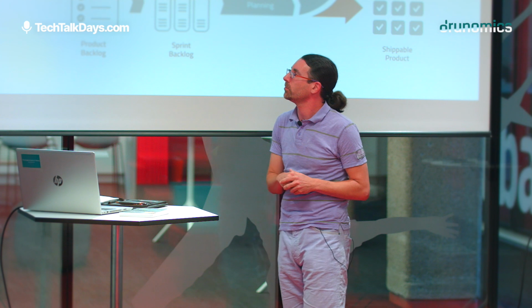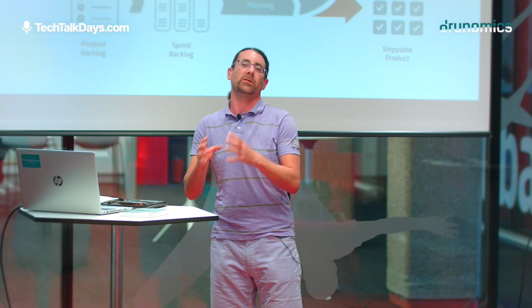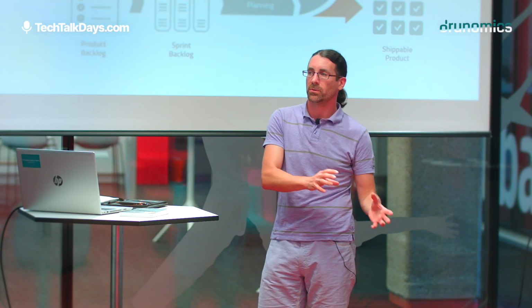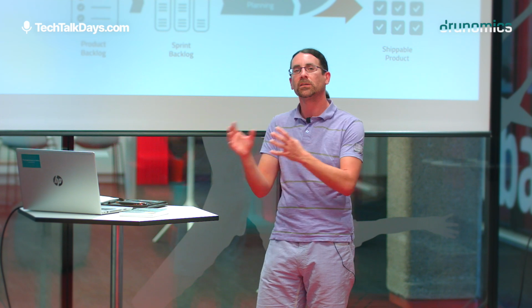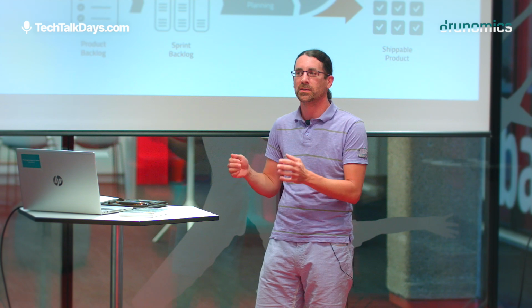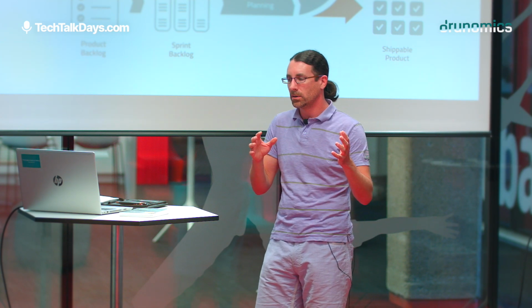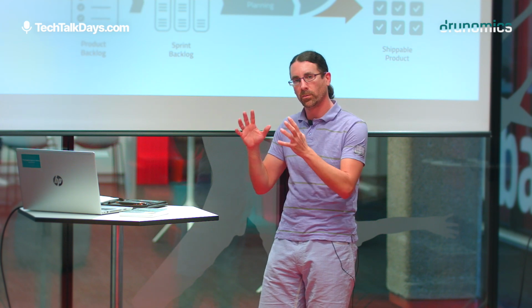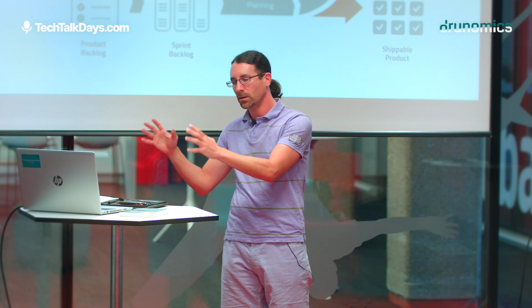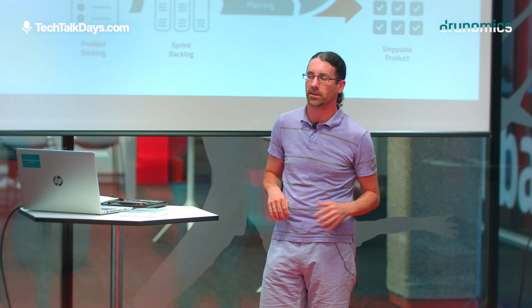The last thing I wanted to highlight was the development team size. So small teams can be very effective, but they need to have the tools in order to be able to develop. So if you're very front-end heavy for the moment and you need to interact with a lot of APIs in the back end, we've seen that sometimes you need to take on one or two additional front-end developers and maybe take away one or two back-end developers. So being flexible to say, okay, for this sprint, we're very heavy in this regard. We need people to help us. Having the team set up and prepared is actually very key to being able to deliver in that next cycle.